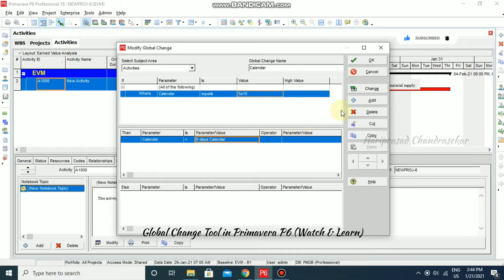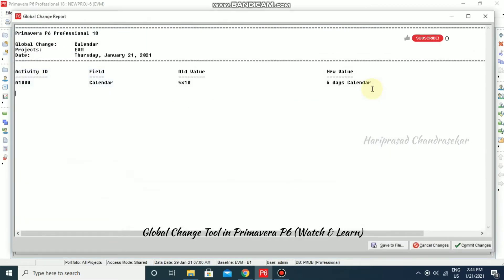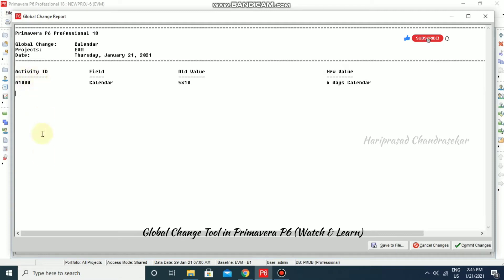Now click Change. Primavera P6 shows a Global Change Report window, listing the Activity ID, the field Calendar, the old value, and the new value. If there are multiple activities, all of them will be listed here. You can go for Save to File or Save Changes to commit, or Cancel Changes if you don't want to apply.